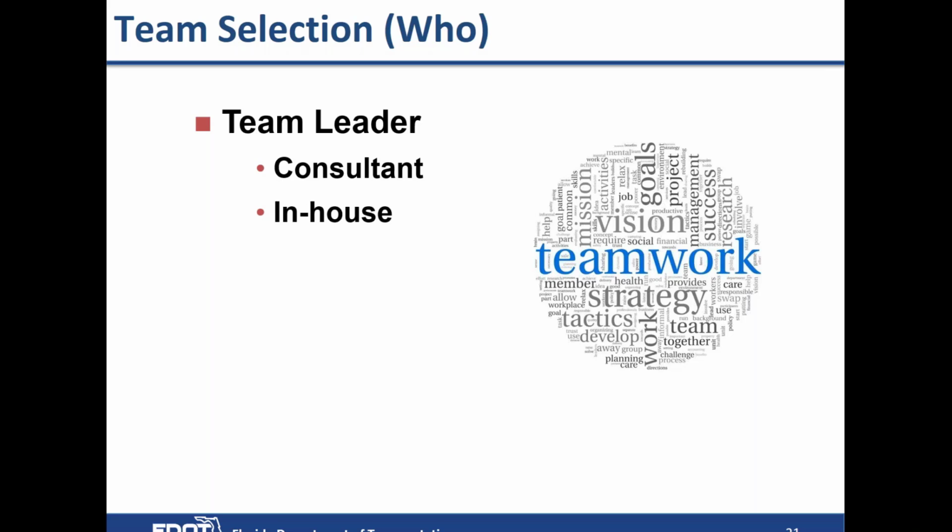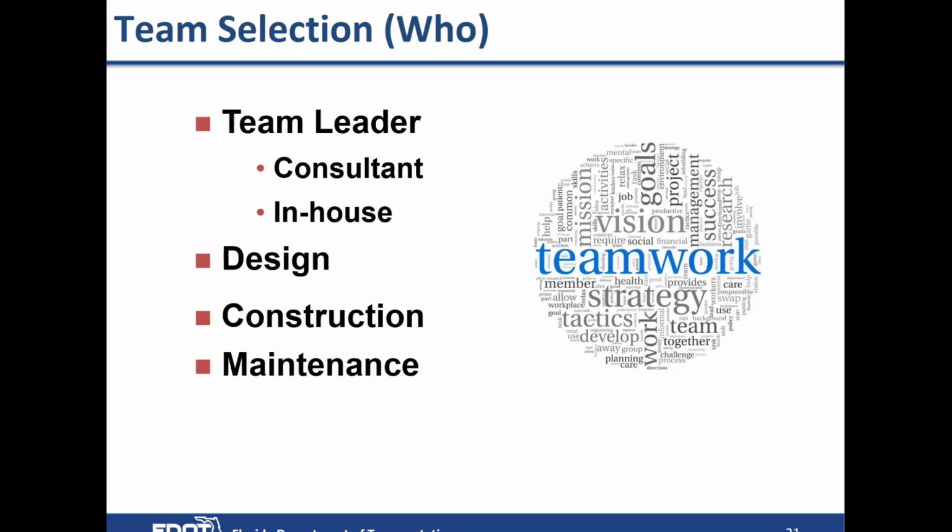We do have some in-house team leaders, and those are employees that have gone through VE training, both team member training and team leader training, and have served on numerous VE studies. We also include a member from design, construction, and maintenance. Those are required disciplines that need to be on the team. And then any kind of specialized expert.